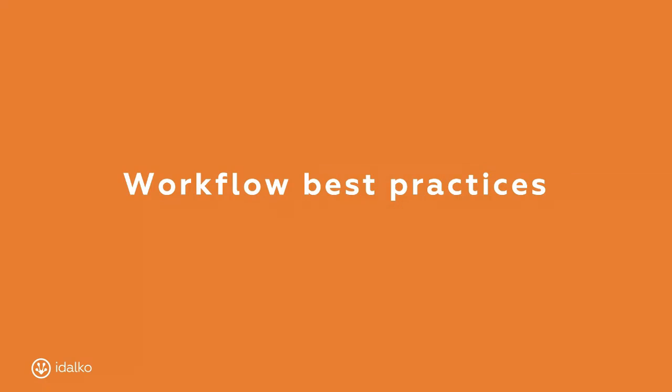Is it to do? Is it in progress? Is it done? Is it closed? And resolutions are applicable only when the issue reached the end of its workflow, when it's in the green statuses like resolved, closed, done, cancelled, things like that. That resolution tells you why or how the issue was resolved, or why it was closed. Resolution actually applies only to the end of the workflow, while a status is something that a workflow is built off. The resolution is the why or the how, and the status is the what, as in what state. Was that clear enough?